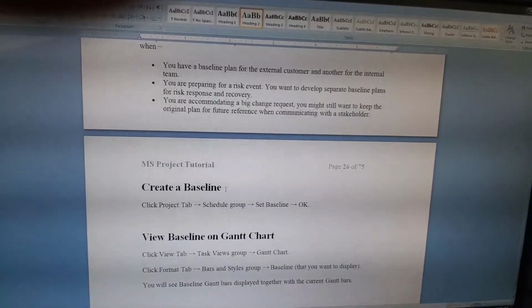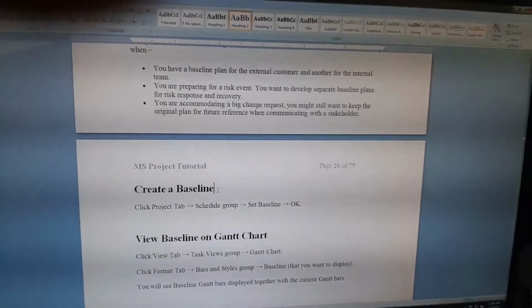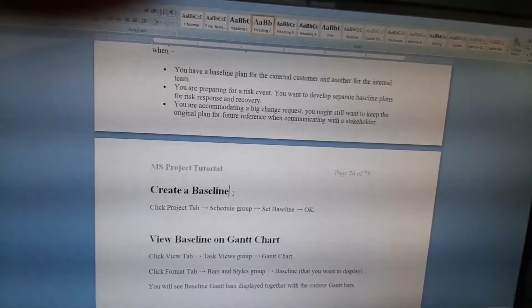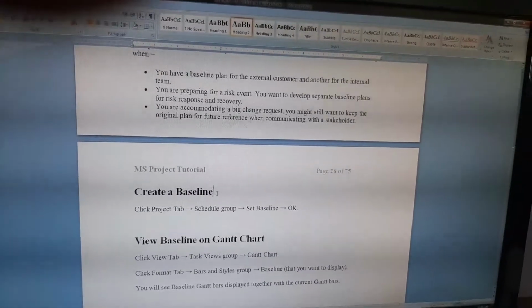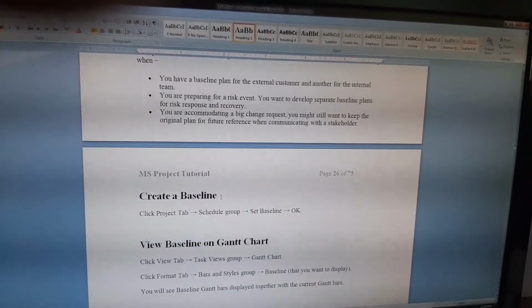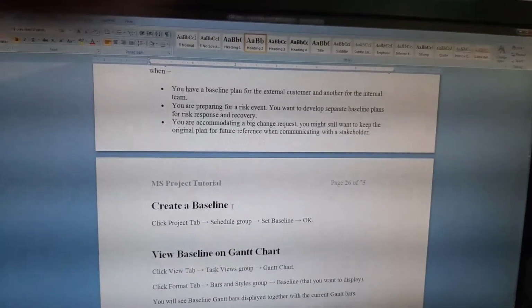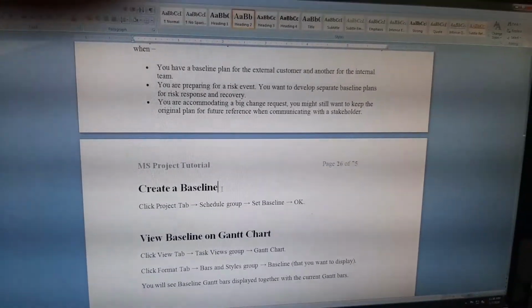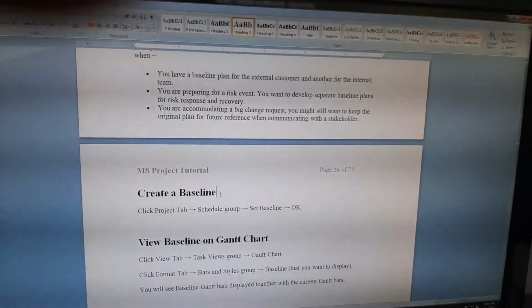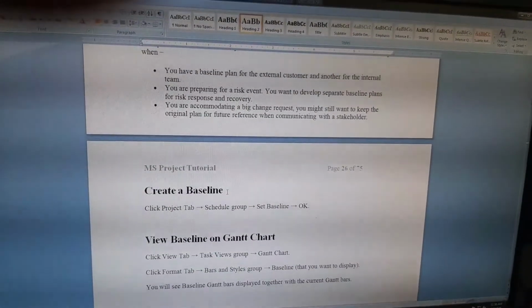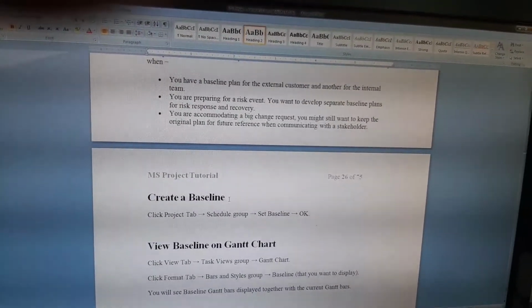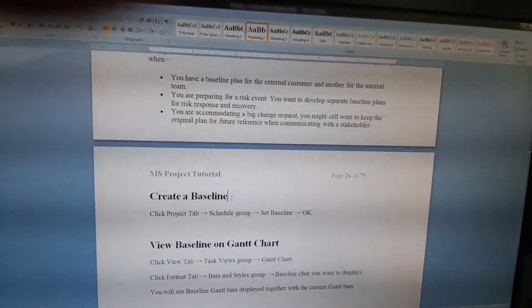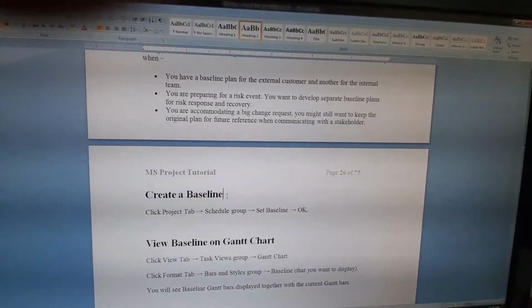So when you create your schedule on the 5th of May, you'll have an idea that today you'll start some work. Suppose today you'll start your excavation work, I mean on the 5th of May. For some other reason you couldn't start the excavation, so what will happen is your excavation starts on the 10th of May. It means there is a lag of 5 days.